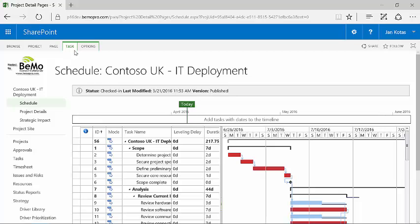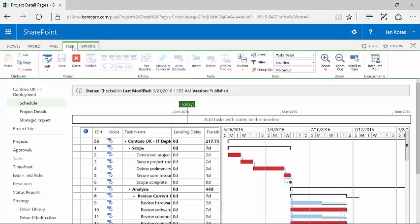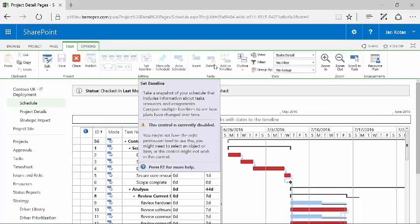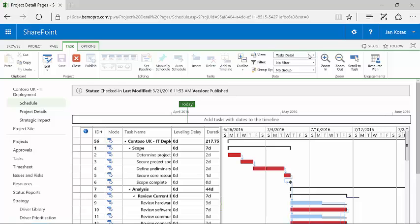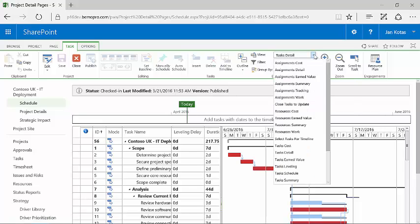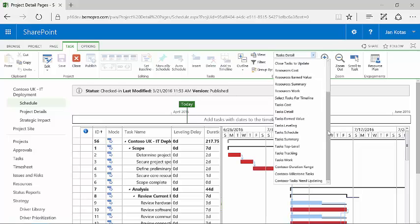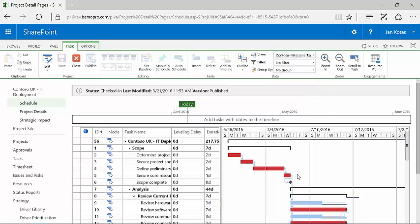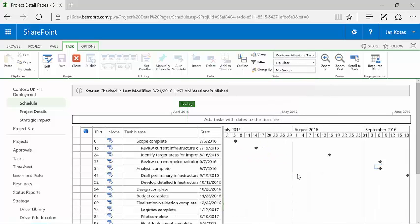Again, what I have here is the ability to view various levels of detail. One of the interesting things and one of the powerful features is that I can create views that focus on specific types of tasks. So for example, I have a whole bunch of milestones in my schedule so I can look at a milestone view. And therefore what it has done is it has filtered out, remove from the display - they are still there but remove from the display - all of the tasks that are not milestones.